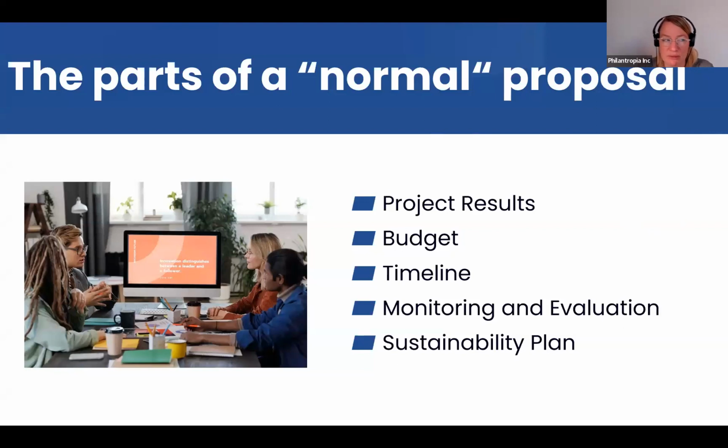And again, when donors give you guidelines about things they want to see in a proposal, the structure might be different. And in those cases, you have to follow those guidelines in every detail. So you just have to cover what they ask you, and whichever words they use, you use those words. So if they are not asking for the project background, but for the justification, then you call it justification. If they don't ask you to send in a monitoring and evaluation plan, then you don't have to do that. It's good use for you internally.